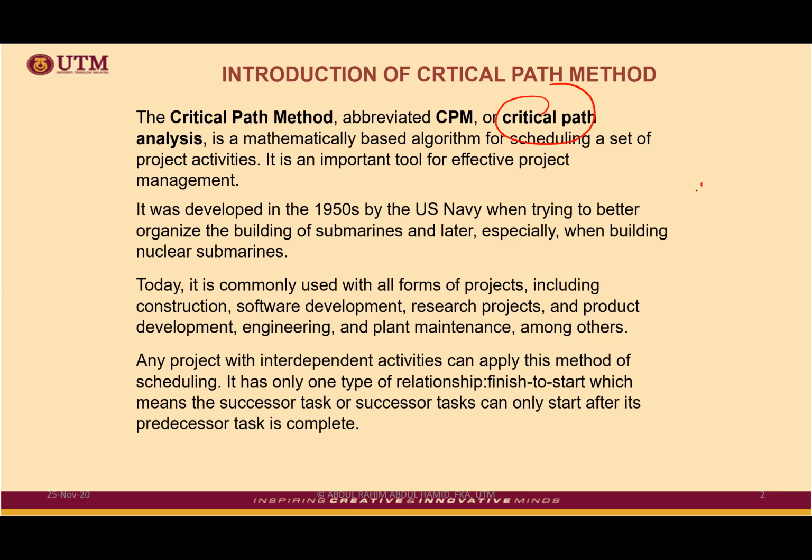And then we can always also calculate total float, free float, so that we can basically analyze the impact of delays to subsequent activity or eventually to the overall project duration. Critical path method is the calculation method to derive those things. And then we can use network diagrams such as AOA and then AON and subsequently PDM. So critical path method can be applied into this concept.